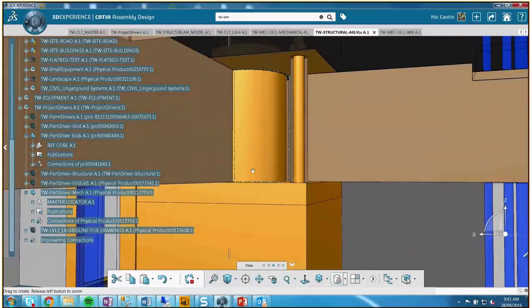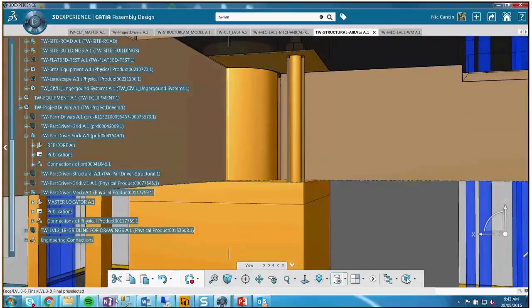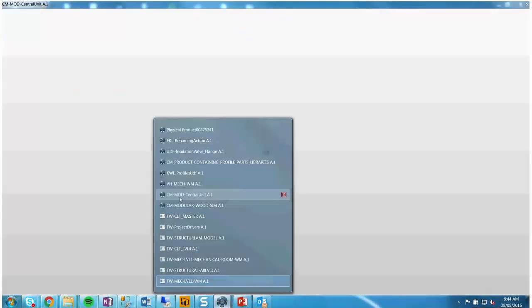But the long and the short of it is, we'll get into it, but obviously this is the first time this building's ever been built, and everyone was collaborating for sure. They built 17 stories in 9 calendar weeks, and the general comment back was everything just went together really well. They just flew up the building. At the end of it they were close to 3 floors a week output, so they actually improved as they went up the building in terms of the actual production.